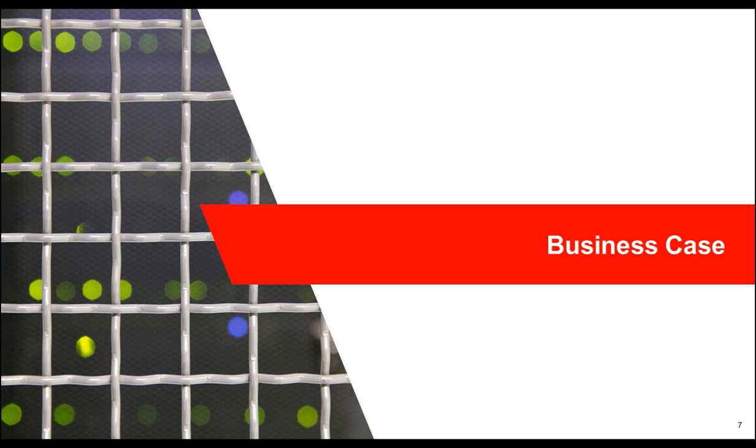So just a quick background, we had a very non-standard way of managing our overall business case model at Equinix, where we had our cross-functional teams just having discussions, making very subjective decisions around which things we wanted to prioritize for a given release or fiscal year, coming up with estimates around what we think the budget is, but not really coming up with where we see value coming back by implementing these things. So our goal was for us to come up with the right criteria that's going to allow us to quantify that ROI, give us an idea of what our net present value is and our IRR is for any projects or enhancements that we get from the business.